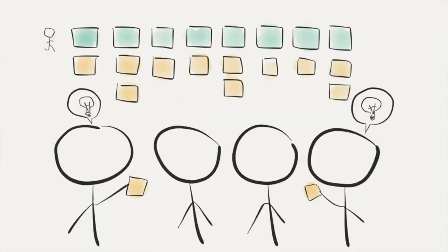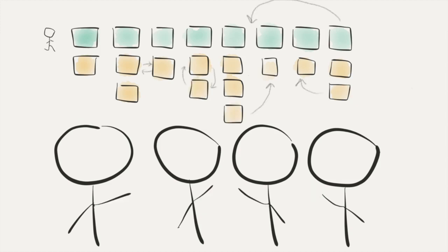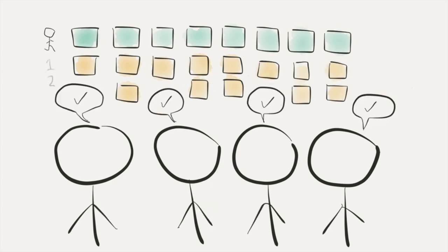Finding a software solution that is valuable, feasible, and usable requires the input and effort from more than one individual. It's not just up to the BA or architect to write the user stories. Prioritize the user stories according to specific business goals. Ask what target user's goal is most important, rather than what feature is most important. User stories enable the project team to stay lean and keep focused on what is necessary.